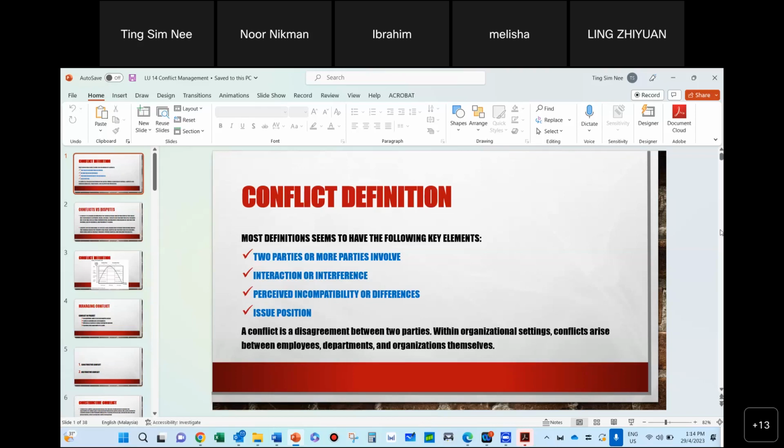The formal dispute resolution method usually calls for arbitration in a specific region that both parties agree upon and that is not in anybody's home country. Normally, if we have an arbitration with China, for example, the most common places we will go for arbitration will be Singapore or Hong Kong. These are considered independent, although of course Hong Kong is not independent of China; in terms of administration, it is a separate region. It is closer to Malaysian law because they have been following British laws all this time, so there is kind of a balance over there.